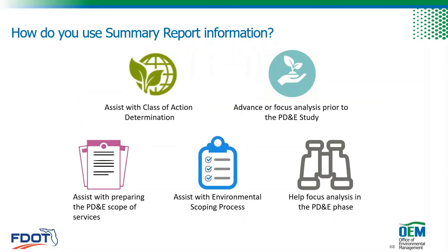Some of the things that it's used for, as I mentioned, the input summary information from the ETAT and from your PEDs, and all the data that you have access to can assist with the class of action, and the level of analysis and the focus for your SEER. For example, through coordination with an agency, you may find that a certain element doesn't need to be studied as much, and something else might need more. So you can focus your PD&E scope using that input.